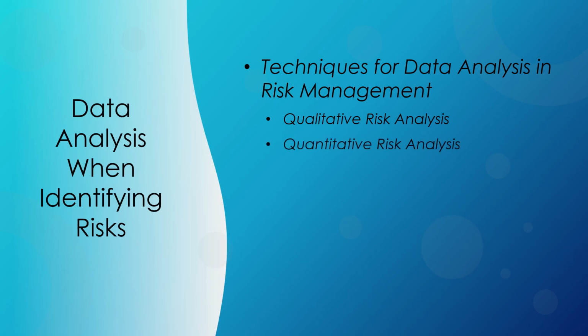Quantitative risk analysis uses statistical or mathematical methods to evaluate risk probability and impact. Techniques include Monte Carlo simulations, decision trees, and expected monetary value, or EMV. This approach provides a more precise assessment of risk and supports data-driven decision-making.